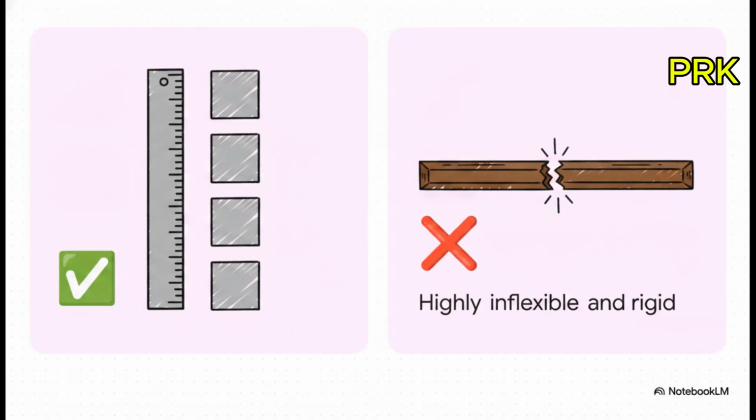Now, Waterfall's advantages are definitely its simplicity and its clear structure. It is wonderfully easy to manage because the milestones are totally rigid. But the disadvantages? It is terribly, terribly inflexible. It's really unsuitable for projects where requirements might change down the road. It's best used for short, super well-understood projects, like, say, a simple payroll system, where the rules are clearly defined by law and they just won't shift halfway through development.